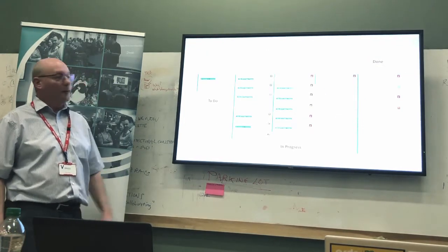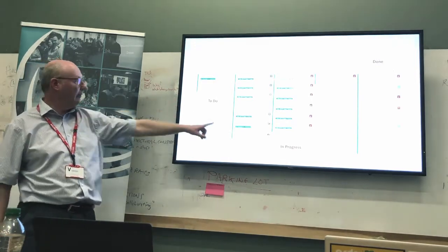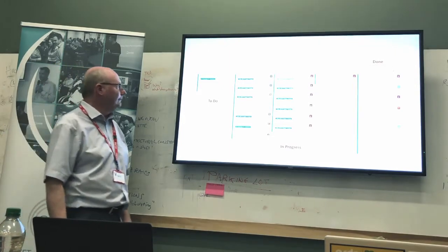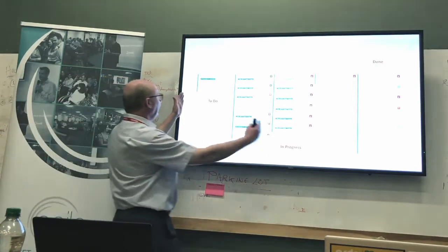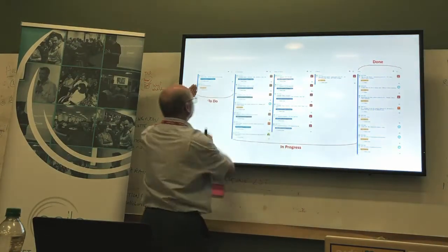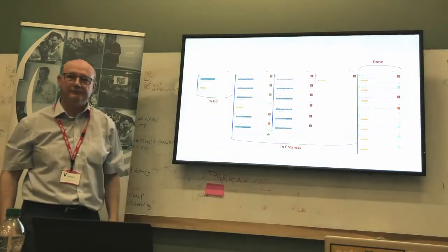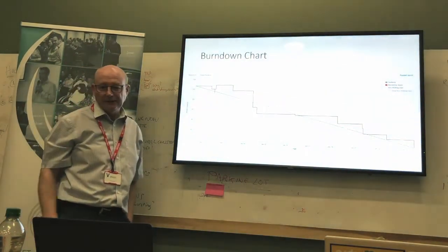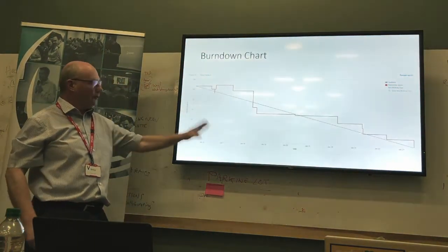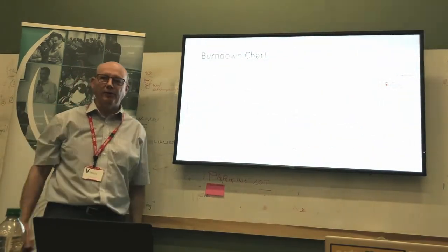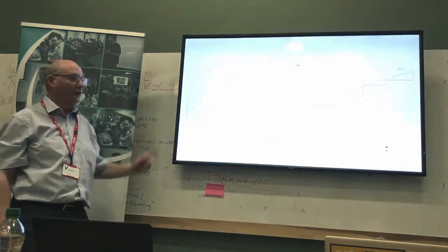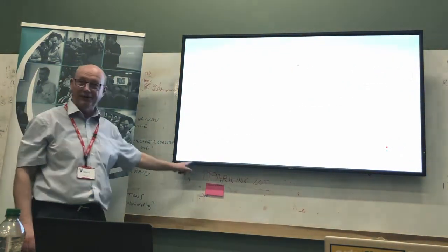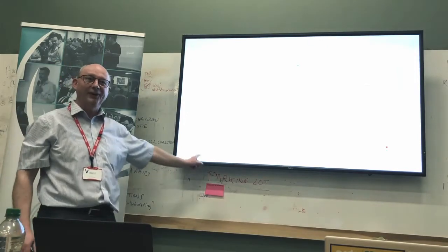Okay, coming back to our Kanban, our to-do, our in progress, and our done. So previously, our burn down simply takes all the points in this area and plots that as a graph. So there's your burn down again. Now, I'm not such a big fan of burning down. I like to see positive progress. You just turn it upside down, right? That is the same chart, literally upside down. You can see all the prints upside down. Okay, now it's a burn up chart.